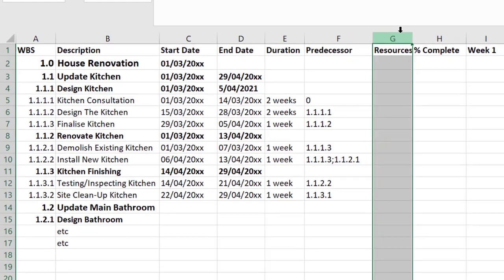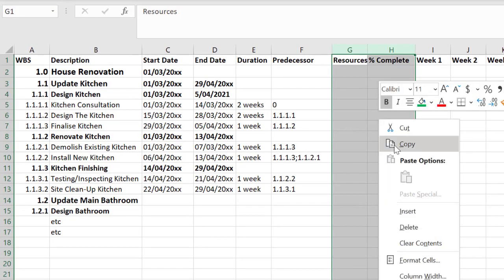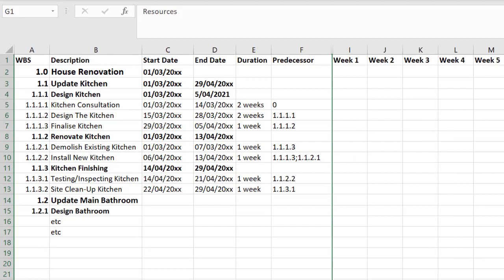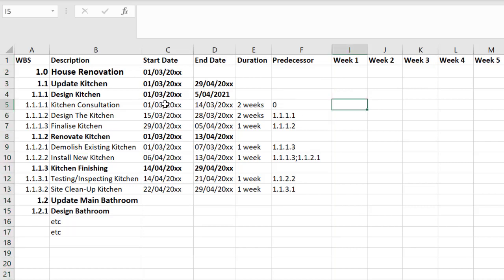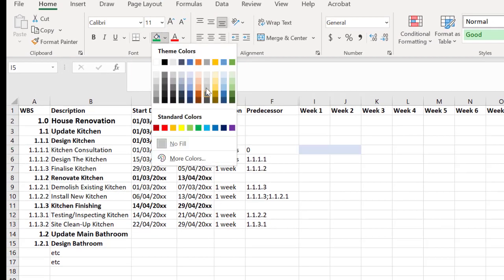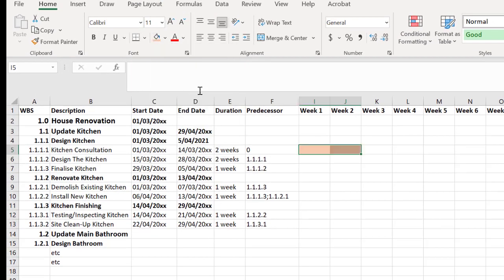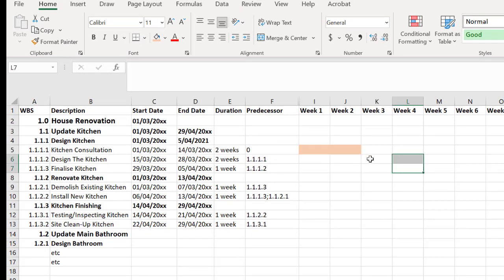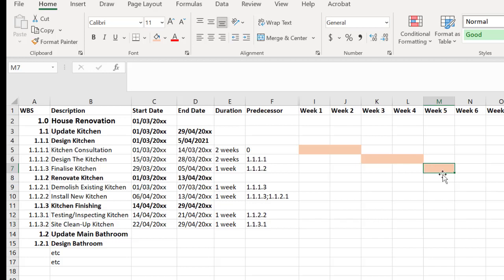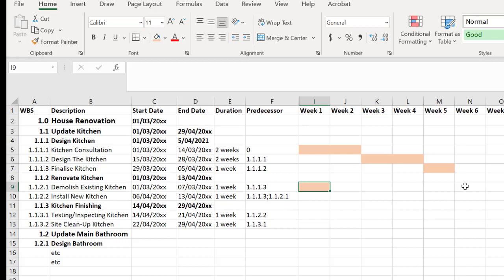Now I'm just going to hide these two columns here just so we can see our timeline a little bit more clearly. And so to put in the timeline we just want to look at when things start and finish. So this is going to start in week one and go to week two. I highlight those and I'm just going to color code so that I can see it as a bar representation. The next two weeks are going to be for the kitchen design it tells me that and finalizing the kitchen is going to be done in week five. So this is already showing us the relationships finished to start relationships between these tasks. When we come down to demolishing the kitchen though it says it takes a week and we can actually start that on day one. The next task though installing the kitchen can't be done until the finalization is done and so that needs to be marked over here.